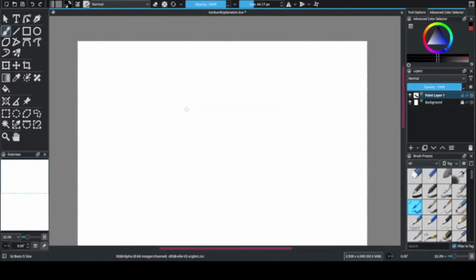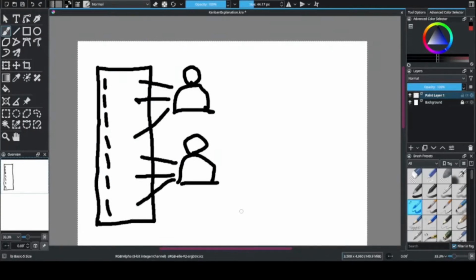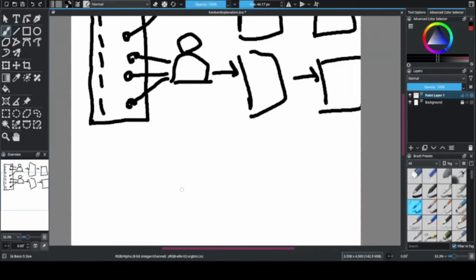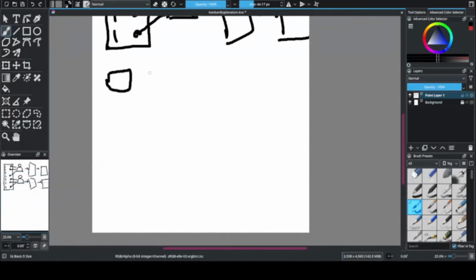And so in the typical structure, there'll be a lot of tasks in the to do. And each person will grab a couple tasks, and that'll be their projects for the day. And they'll move it to a doing list, and when they're done, it'll move to a done list. And that way, each individual developer gets to choose what their tasks are for the day and what's a manageable load.